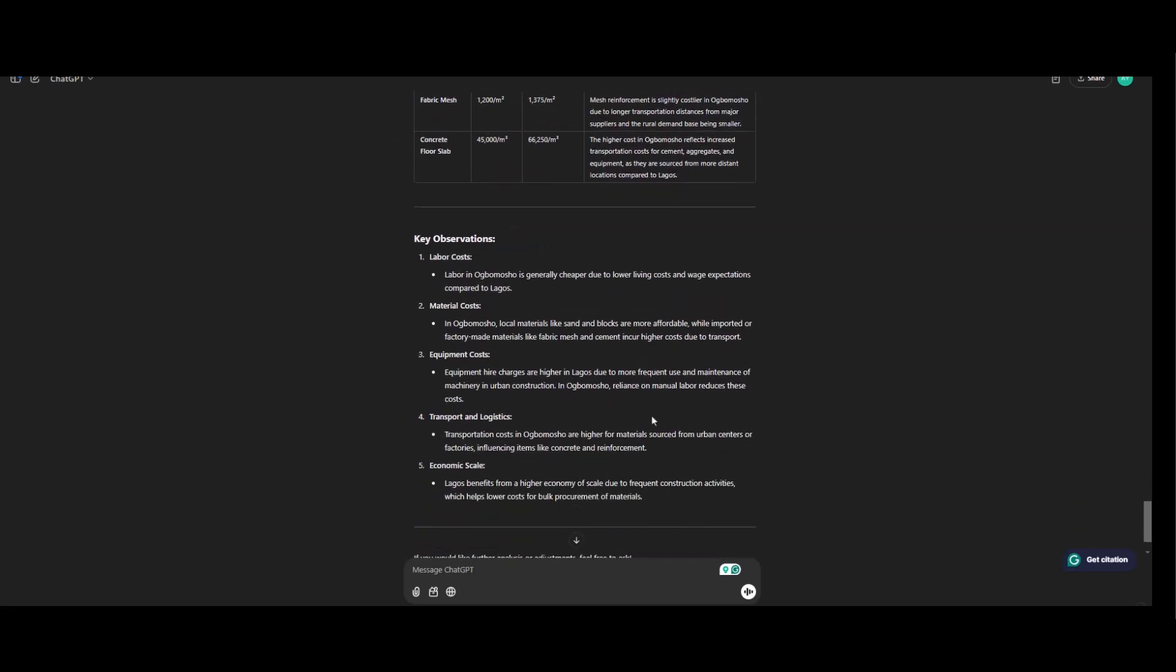Key observations. Labor cost in Ubumosho is generally cheaper due to lower living cost and wage expectation compared to Lagos. Material cost in Ubumosho. Local material like sand and block are more affordable.